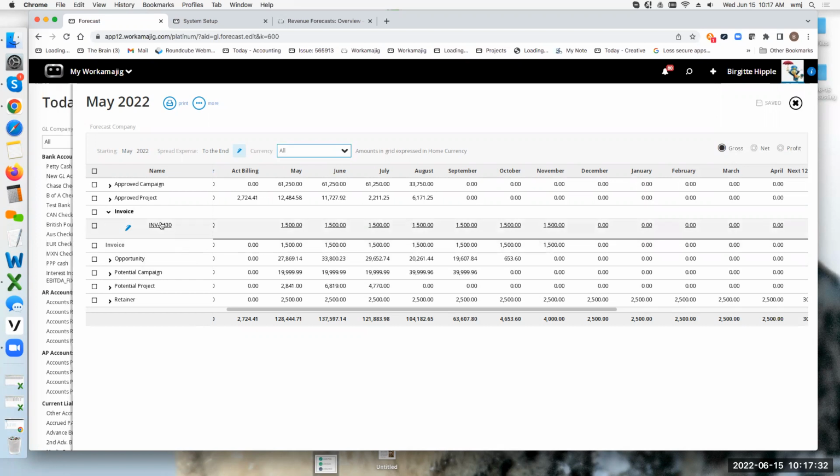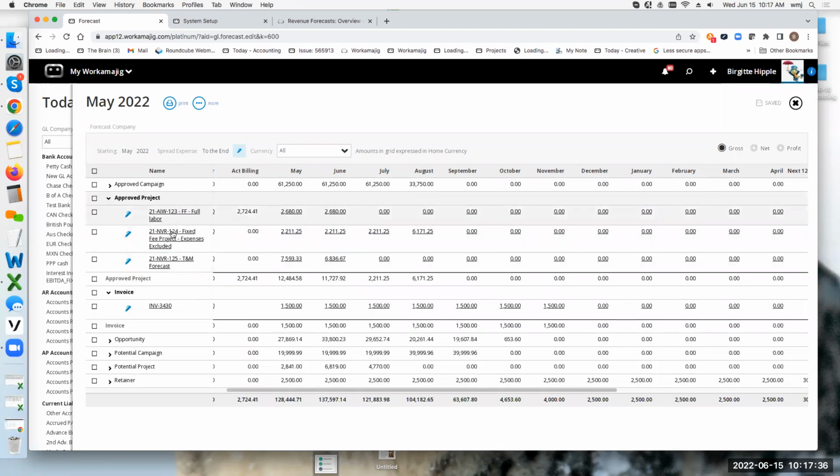Okay, it does not show the project on here. Where all of these others will show the actual project number, a scheduled invoice can have multiple projects on it. So if you're looking for specific project information on this, then you may want to set up separate scheduled invoices, or actually just do a fixed fee type of thing. So the scheduled invoice will never show you the project number because you can have multiple projects on one single invoice. Okay.